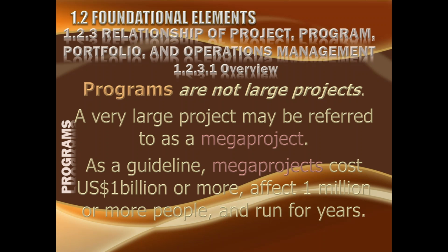But if we look at it in a different manner, if we say that the construction of colony is not the target, it is rehabilitation of the people, or providing accommodation to 500 families in this area. This could be the benefit achieved through the program. Then program will decide how this area has to be developed and how many projects will be there inside it. But if you specify that a colony of this dimension is to be created, then this is a mega project. This is not a program.